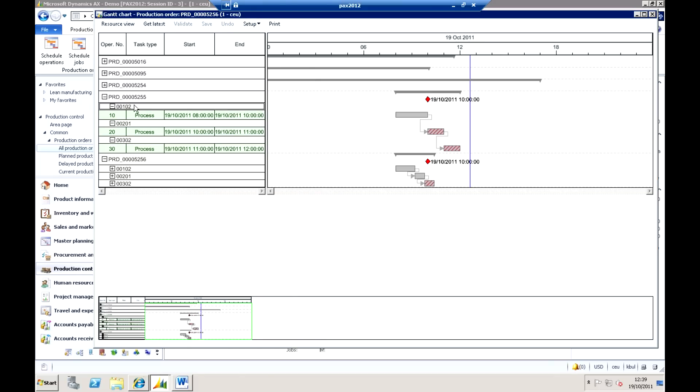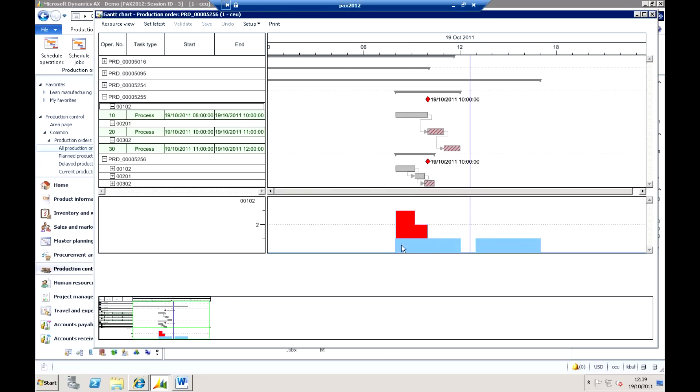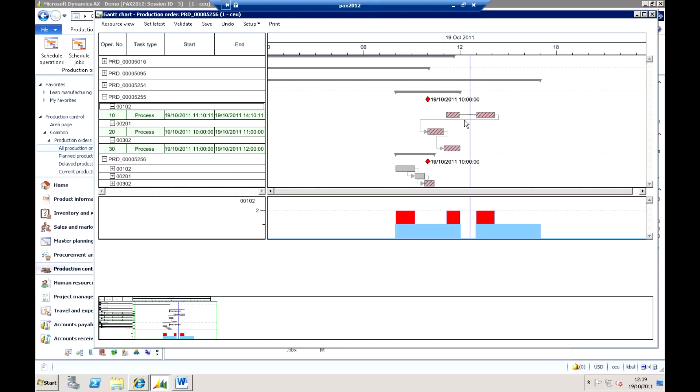Another view of this particular screen is the ability to just right click on a resource and say show me a histogram. So this is basically, if we just look at the details here, I'm seeing a histogram. Now where it is filled in in blue, that means we are using standard capacity. But when it goes into red, we're actually over capacity. So I've allowed myself there to actually work on an infinite capacity basis. And it's straight away telling me that I'm actually going to need to use this person for more than their standard eight hours a day. And this is showing me the number of hours that I am going to need. And again, as we drag and drop and move those around, that moves accordingly relating to that.